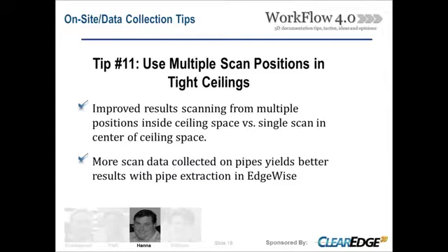Yeah, I'd like to make a comment on that too. The lower the ceiling clearance is from the plenum, ultimately the more scans you're going to have to get to saturation in that area. So if they send someone out to get an estimate or something along those lines, if they know nothing else, have them check what the span is from the plenum up to the hard surface of the ceiling. Okay.